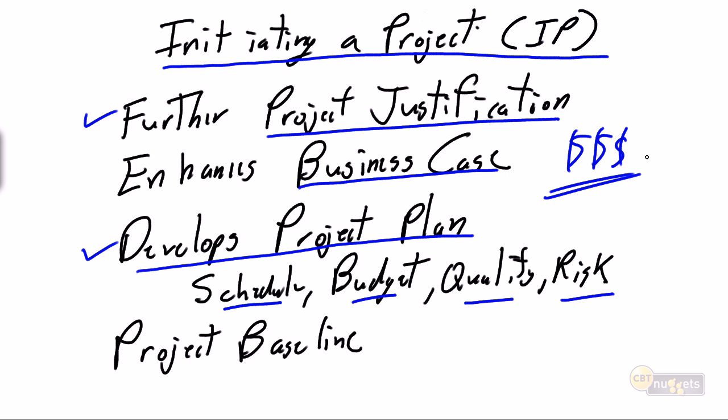And with all of the yeses to these aspects, we have the complete project plan. We define the scope and all of the work packages to identify all of the work required to successfully complete the project. This is where we developed that budget. This is where we did the refinement. We guessed it was 50, but now it turns out to be 63. This is where we refine the quality approach.